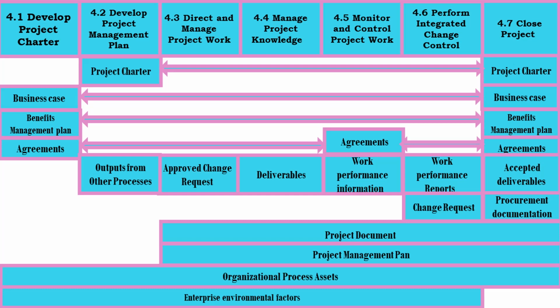Infrastructure such as existing facilities and equipment, stakeholders' expectations and risk thresholds, and regulatory agency regulations, product, quality, and workmanship standards. Organizational process assets. The organizational process assets that can influence the monitor and control project work process include organizational standard policies, processes, and procedures, financial controls procedures such as required expenditure, issue management procedures defining issue controls, identification, and resolution, defect management procedures defining defect control, identification, and resolution, monitoring and reporting methods, and organizational knowledge base, such as